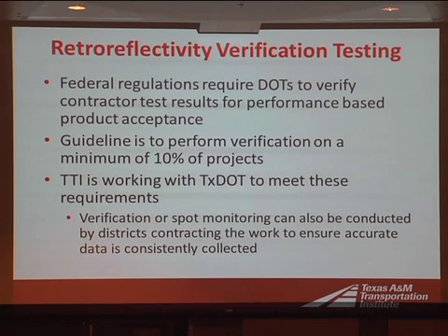So to make sure the contractors are turning in acceptable data, the federal regulations require that the contractors are monitored to make sure that the data they're submitting is accurate. The guideline is to perform verification on a minimum of 10% of projects. So we're working with TxDOT to meet these requirements.